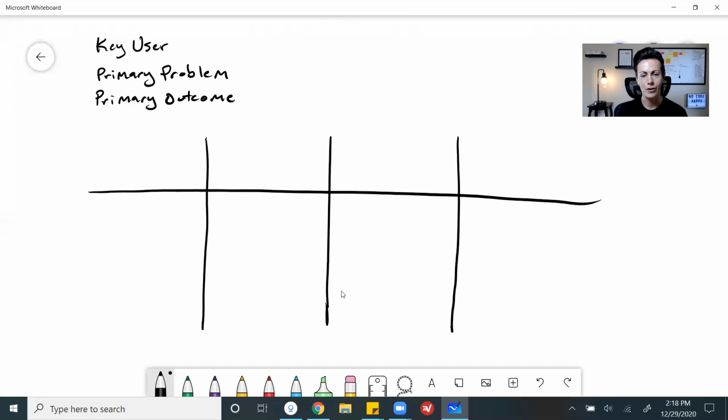Now, what you can do before you start this, and what you may find really helpful, is to take 30 minutes, an hour, however long it's going to take you, and just write out a full list of all the features that you've envisioned your app having. Every single little feature. So all of the main features are what we call bucket features, and all the sub features within those. So, let's say you have a booking feature in your app. Well, a booking feature has lots of features in and of itself. You might be able to add custom times to the calendar or block out custom dates or send custom invitations or whatever it may be, right?